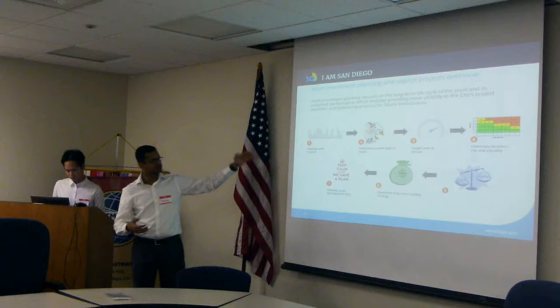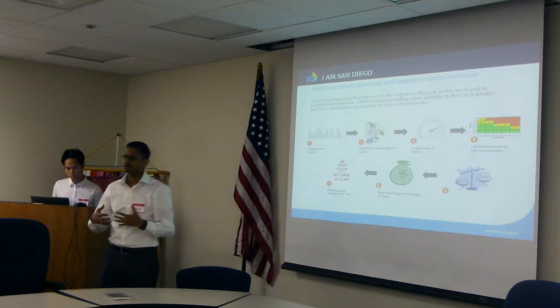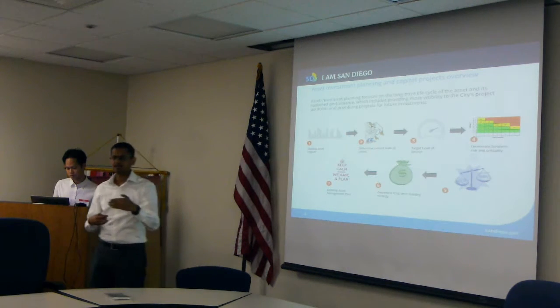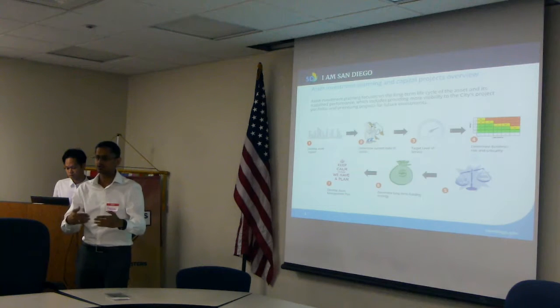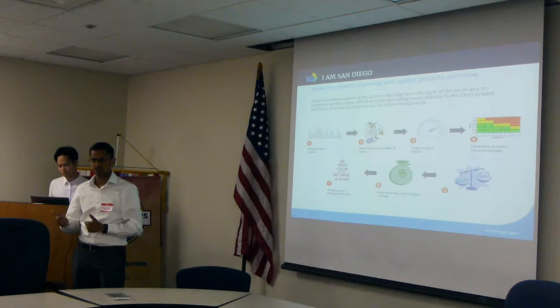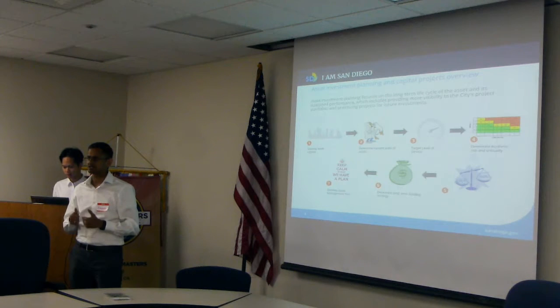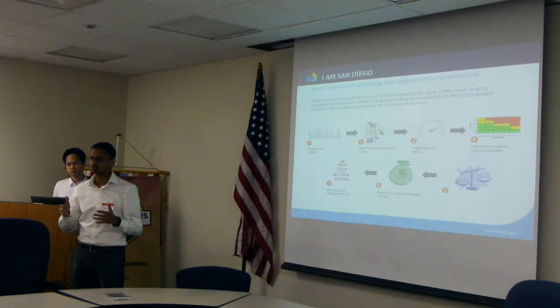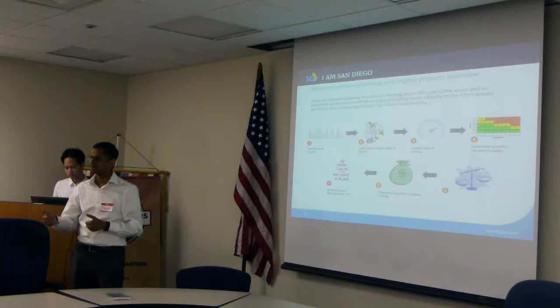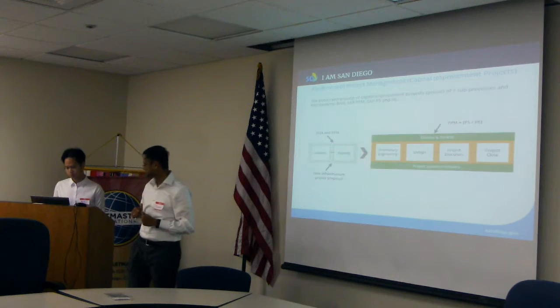Now, once Riva gets this information, Riva then suggests that you work on this particular asset. That information is fed into another system called PPM, which is Portfolio Project Management, where the life cycle of a project starts. If Riva says that a particular asset has to be worked on and it needs a project for us to work, that information is fed into PPM. Go on to the next slide.